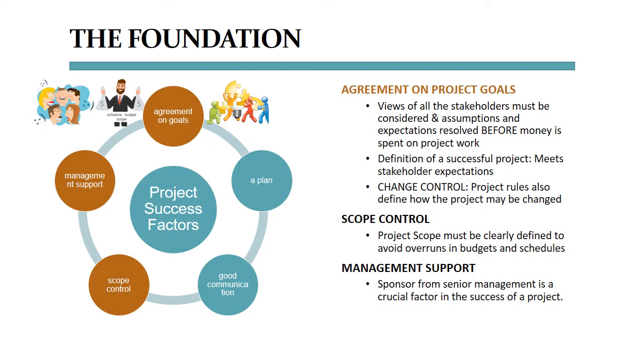Project rules also set up a means by which the project may be changed in midstream if necessary. This change control stipulates that the same stakeholders who agreed to the original rules must approve any change in the rules. The possibility of changes emphasizes once again the necessity of having everything down on paper before the project begins. With this material in hand, you will be well equipped to detail any effects that the changes might have on cost, scope, or schedule in an ongoing project.